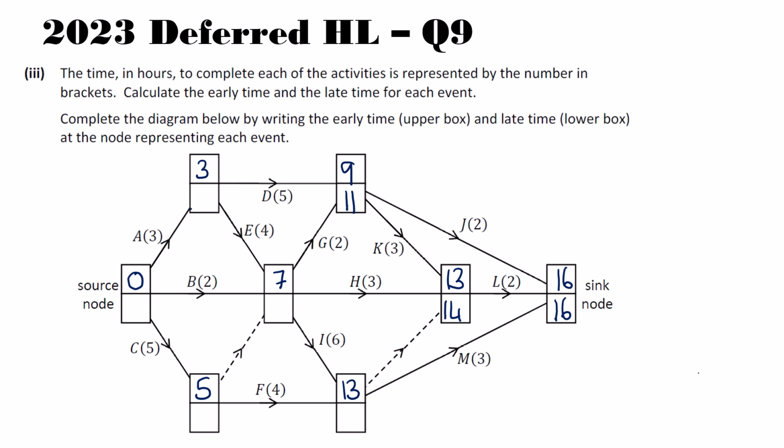So that's 11. Down here, I have 2 feeding out of it. So I have the dummy, which will have no time change, so it's just 14, and then 16 minus 3, which gives us 13. I'm going to pick the smaller, that is 13, and we can keep going.